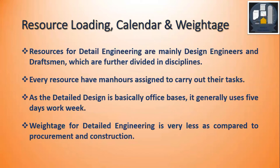Like other schedules, the detailed engineering design schedule also has resource loading, calendar, and weightage. The main resources for detailed engineering are design engineers and draftsmen. These resources are further divided by discipline: process engineers, mechanical design engineers, piping design engineers, electrical design engineers, instrumentation design engineers, civil design engineers, structural design engineers, etc.